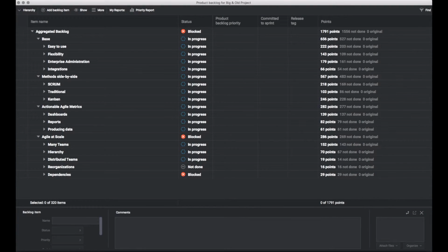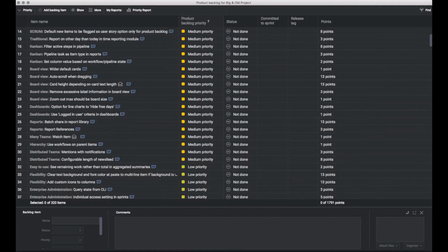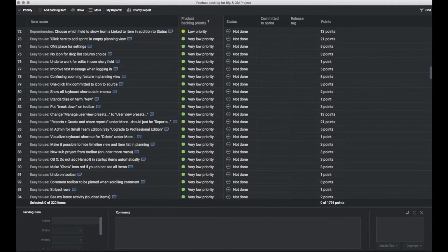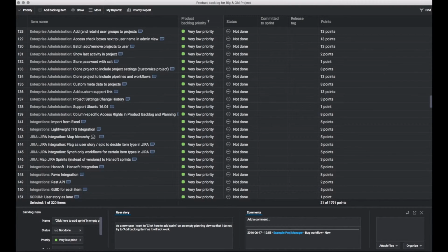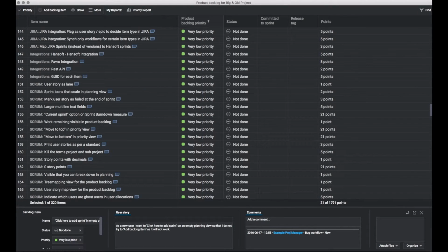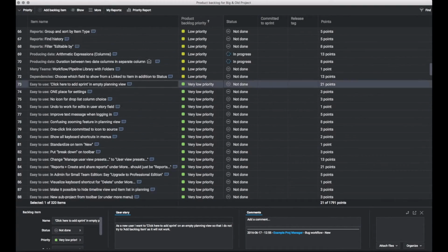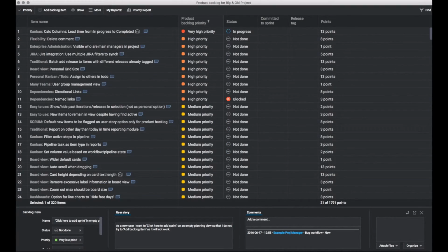Now let's move back to the product backlog. An obvious key activity is to refine your backlog. In order to keep it in good shape, you should make sure that your backlog is detailed appropriately. This means to look at your lowest priority items and see if you can group them or merge them into a single big item instead. As they increase in priority, you can then break them down if needed.